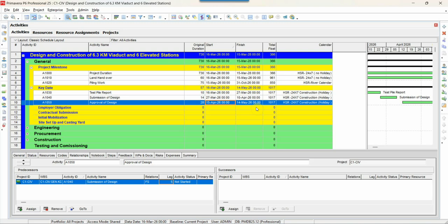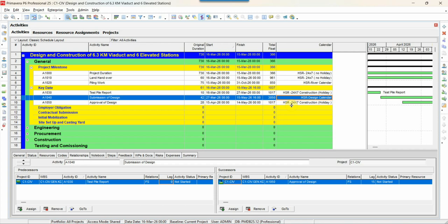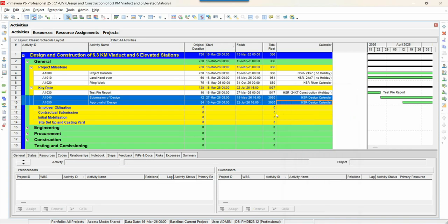So many people say, why are we using a design calendar, because it can serve the purpose based on one calendar itself? So why do we require it? Suppose engineers say that we require a design calendar of 8 hours working and 6 days, because the designer is working 6 days. So if you have submitted your program, now you are going to change the calendar. Suppose I change the calendar here. So 6 into 8, this is our design calendar and schedule.